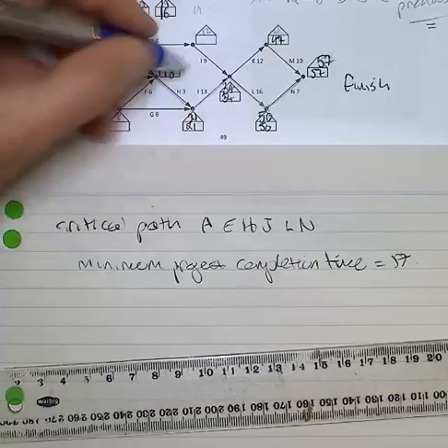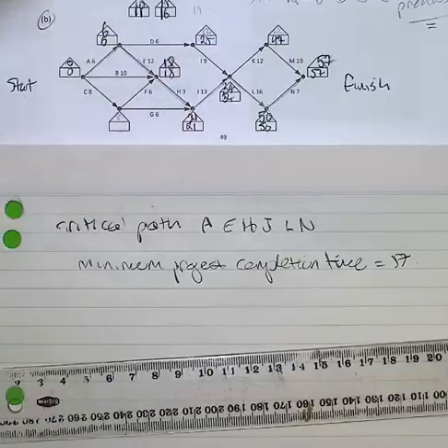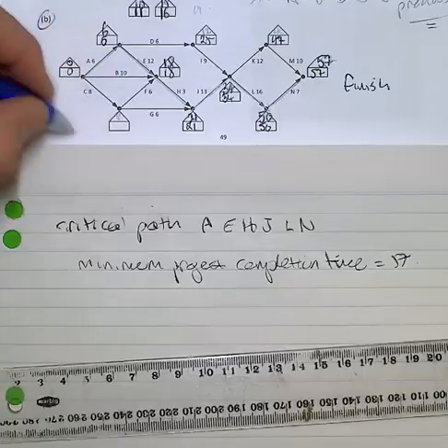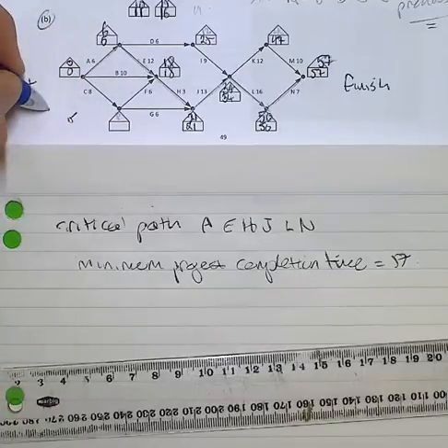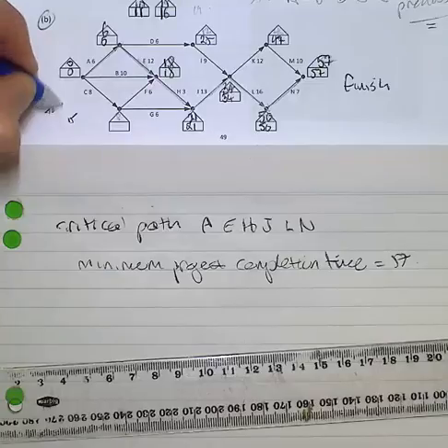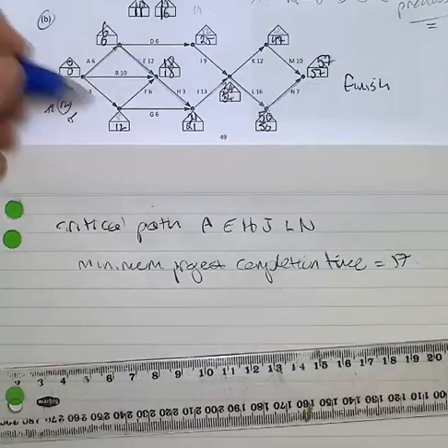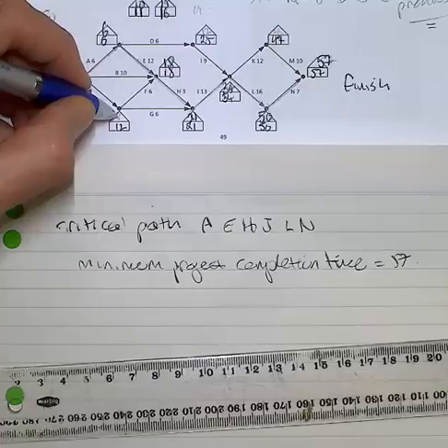In this instance, I've got 34, take 9, which is 25. And back here, a choice: 21 take 6 is 15, or 18 take 6, which is 12. I go the 12. So I always choose the smaller of the two options.